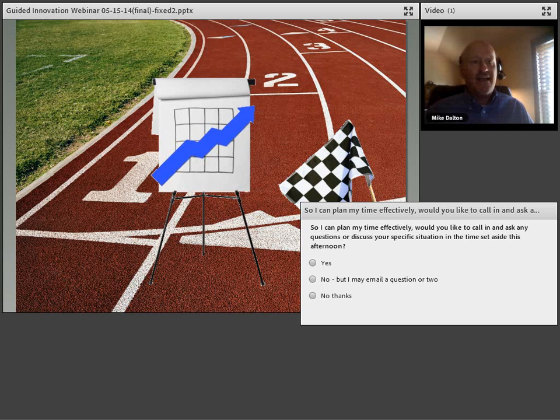Okay, and next, someone's wondering, for a project that usually involves a waiting time, for example, for procurement, why not use that time for the next project? Yeah, and in fact, if you model the project that way, with that waiting time in it, that'll happen. As I talked about before with the staggering, stagger doesn't mean we don't start one project till another's finished. It means we stagger it so that they're not using the same resources at the same time.